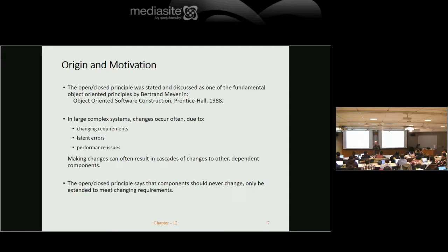Or we have these three requirements that the way we stated them are very difficult for us to implement. But after analysis, we believe we can make these changes, which are easy for us to implement and serve your need just as well as the original statement. That is some negotiation, you know, and by the end of the day, handshake, done deal, okay?